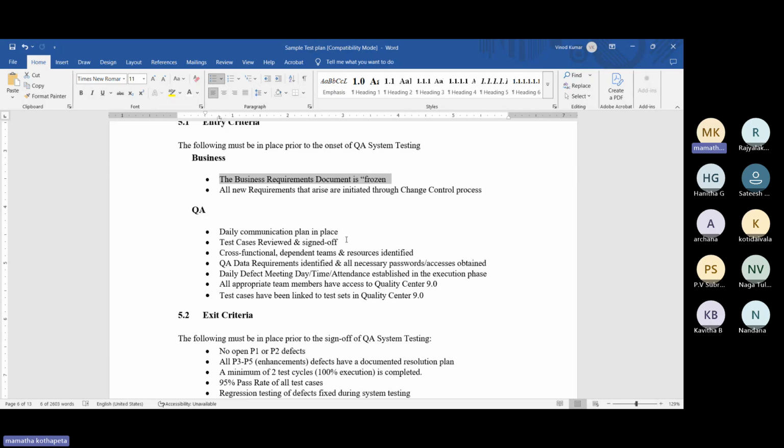And then we'll tell the customer, in order to develop this new attachment functionality, it's going to cost you this X amount, apart from what we are charging for the 10 requirements. That process is called the change control process, which will generally be headed by the CAB.